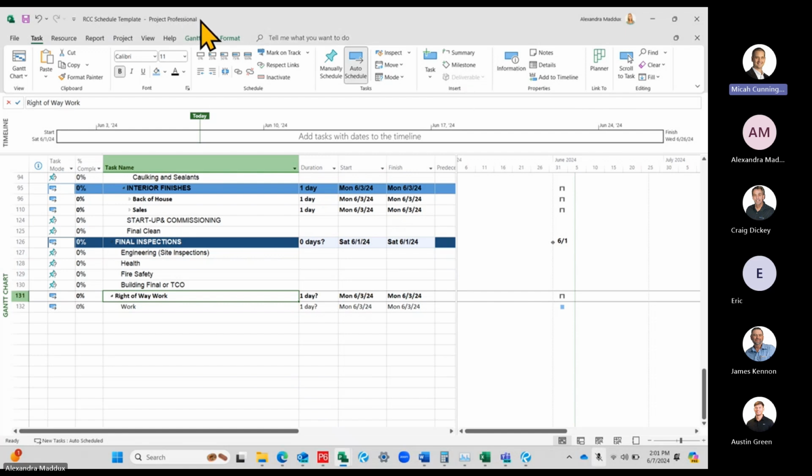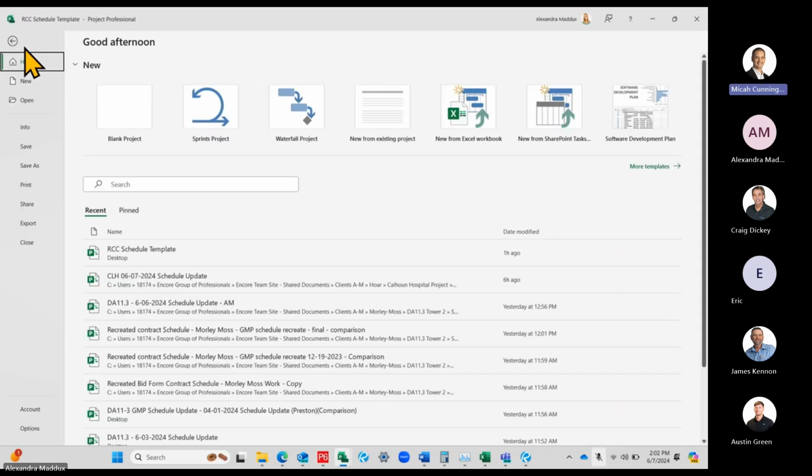And at the same time, say you make your baseline file, you don't want to update that same file. You want to make a copy of it so that you still have your baseline, and then you never touch it, never change it. Otherwise you overwrote the history of that file. That's why it's so important to make a copy first. You can never go back if you override it.